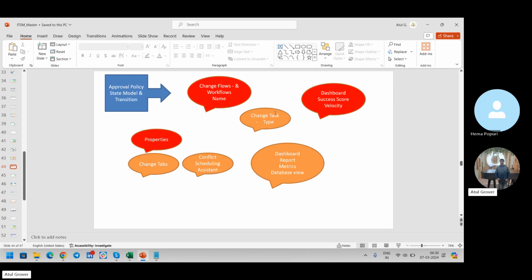So we will discuss how the proposal can be created and then how the standard changes can be implemented in that part. And standard change doesn't require any approval. So no assess, no authorize. From new we will go directly to this part, what I can say, schedule state.